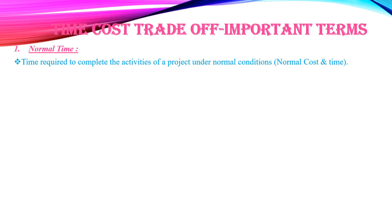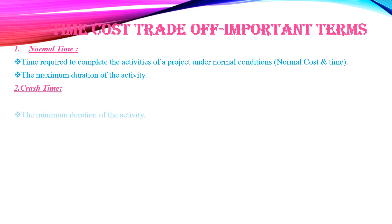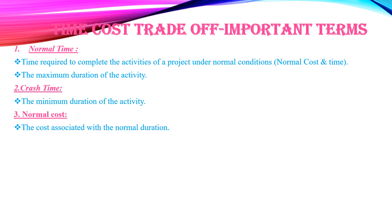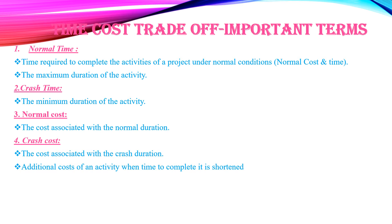Important terms associated with time-cost trade-off: Normal time is the time required to complete the activities under normal conditions at normal cost — it is the maximum duration of an activity. Crash time is the minimum duration for a particular activity. Normal cost is the cost associated with normal duration. Crash cost is the additional cost of an activity when its time is shortened; as project duration decreases, crash cost increases.